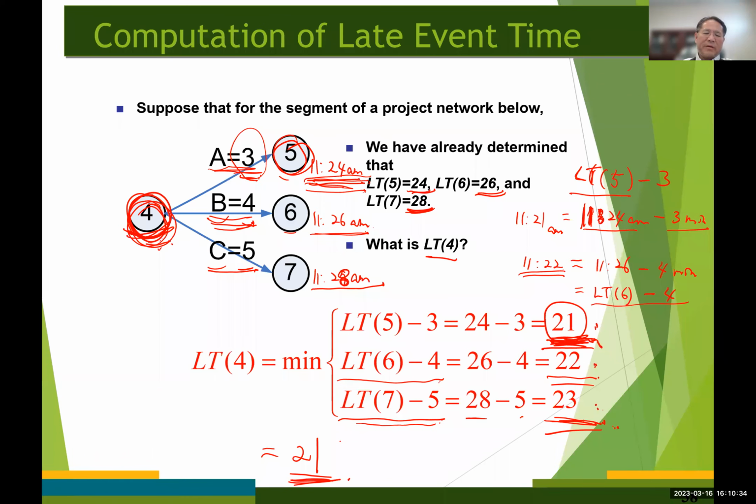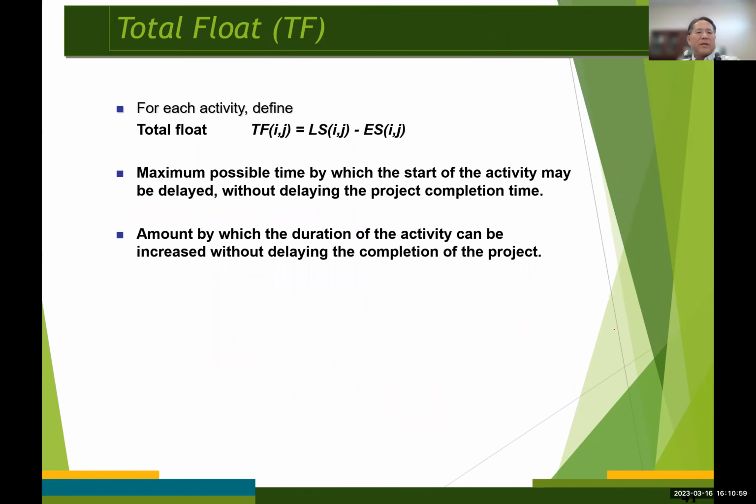So keep in mind that when you compute the latest time, you always go with the minimum value, okay? However, when you compute the earliest time, you always go with the maximum value, okay? Okay, so the next concept is about the total float.